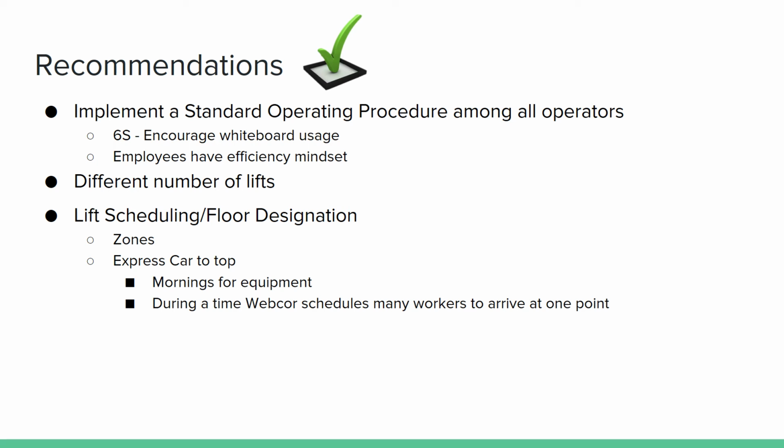The goal of the zones is to assign each lift to a designated floor range. We also want to encourage the idea of an express car traveling to the top floors for a short period in the morning to get equipment up to the top floor, as concrete pouring is the initial step in building the structure.